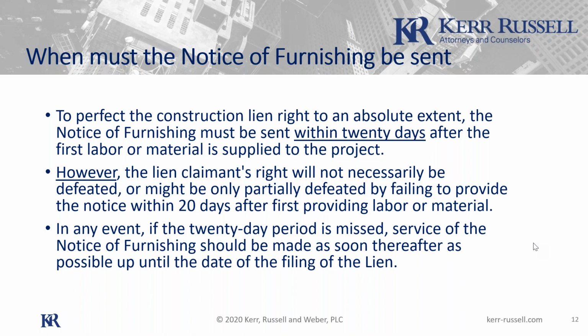So it's always better to get it in because you don't know necessarily whether the owner's already paid for your work to the general. And you don't know whether he did it right. He needs to have done it, quote unquote, pursuant to sworn statements and waivers. And Lord knows that the owners on their side don't always follow all these steps absolutely 100% accurately. So even if you're late, it might be okay.